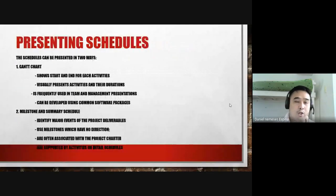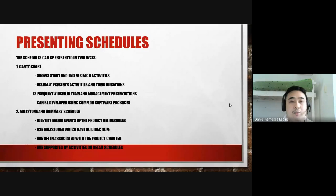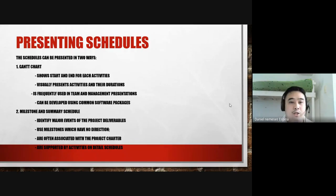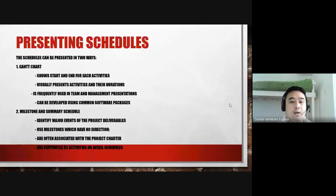Schedules can be presented in two ways. A Gantt chart shows the start and end for each activity, visually presents activities and their durations, is frequently used in team management presentations for stakeholders and sponsors, and can be developed using common software packages including Microsoft Word. A milestone and summary schedule identifies major events and project deliverables, uses milestones which have no duration, is often associated with the project charter, and is supported by activities on detailed schedules.